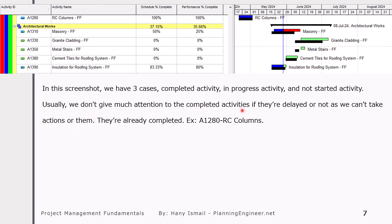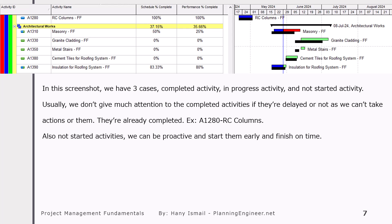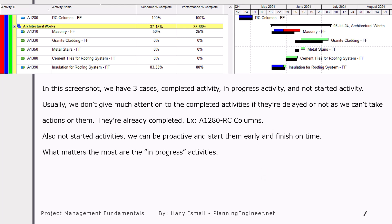Usually we don't give much attention to completed activities since they are already done. For example, this RC column is already completed — we cannot do anything. But we pay attention to in-progress and not-started activities. For the not-started, we can proactively take action to make them start on time. For example, this activity is forecasting to start after the planned date because it is linked to the masonry. So we can do something here to let this activity be completed on time, and accordingly this activity will start on time. In-progress activities are important to check and try to complete on time, because if completed on time, all successor activities will also start and finish on time.